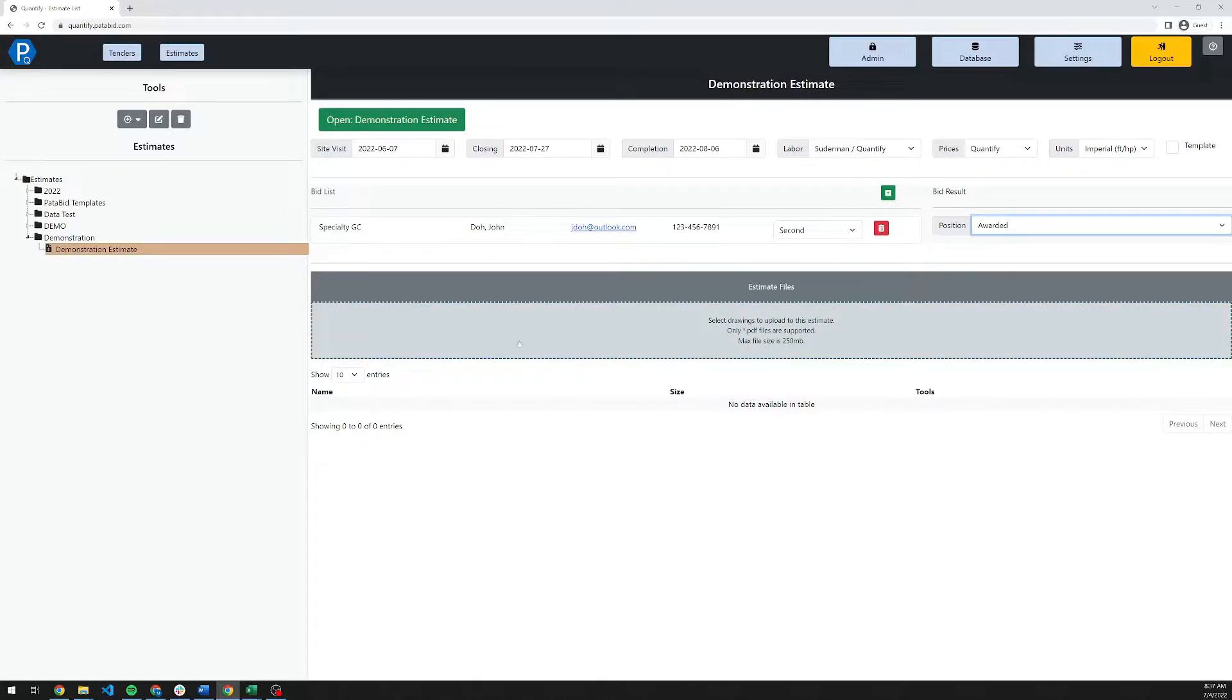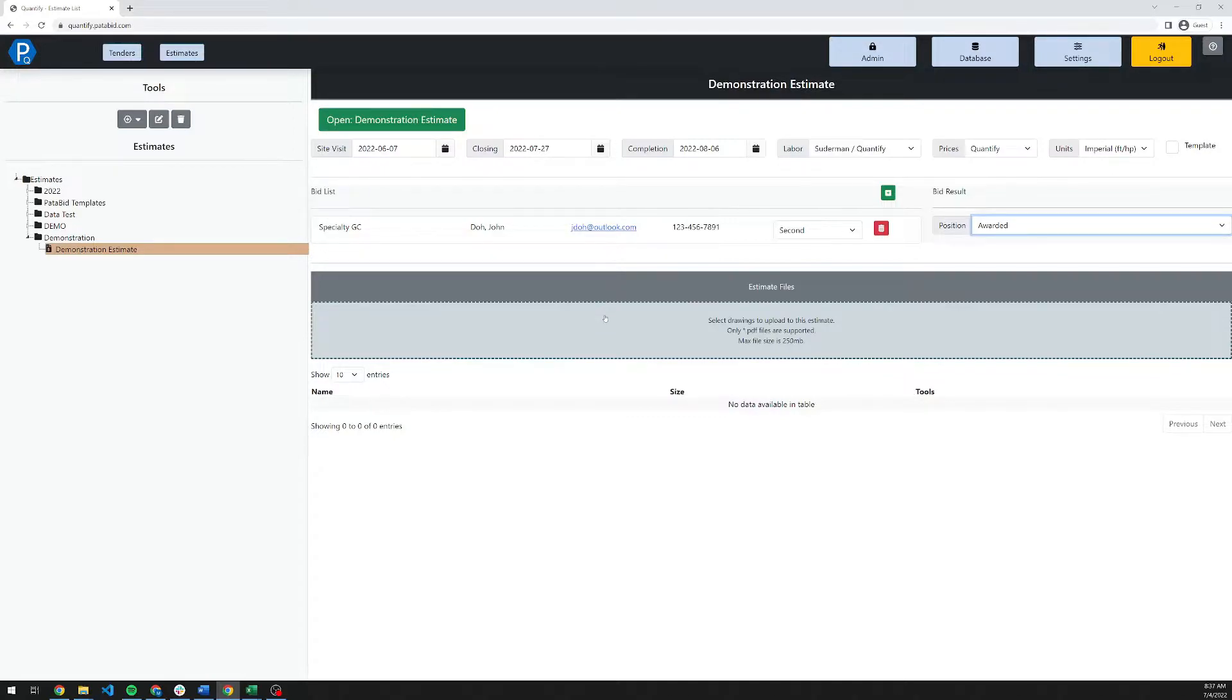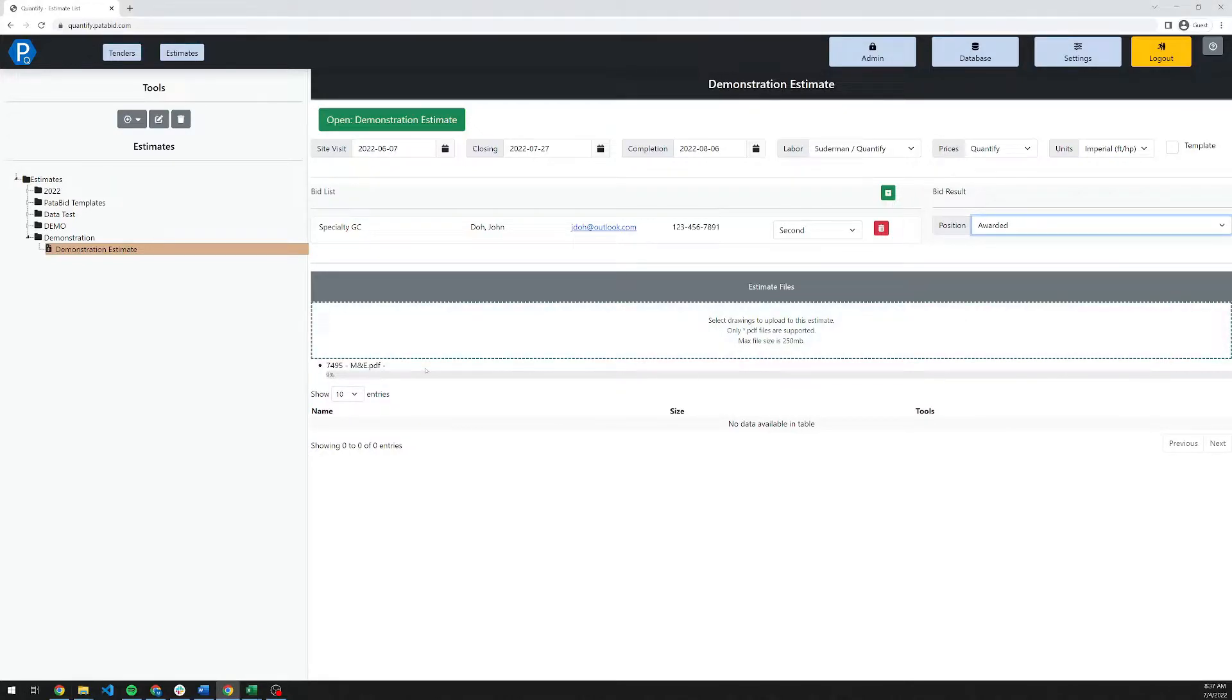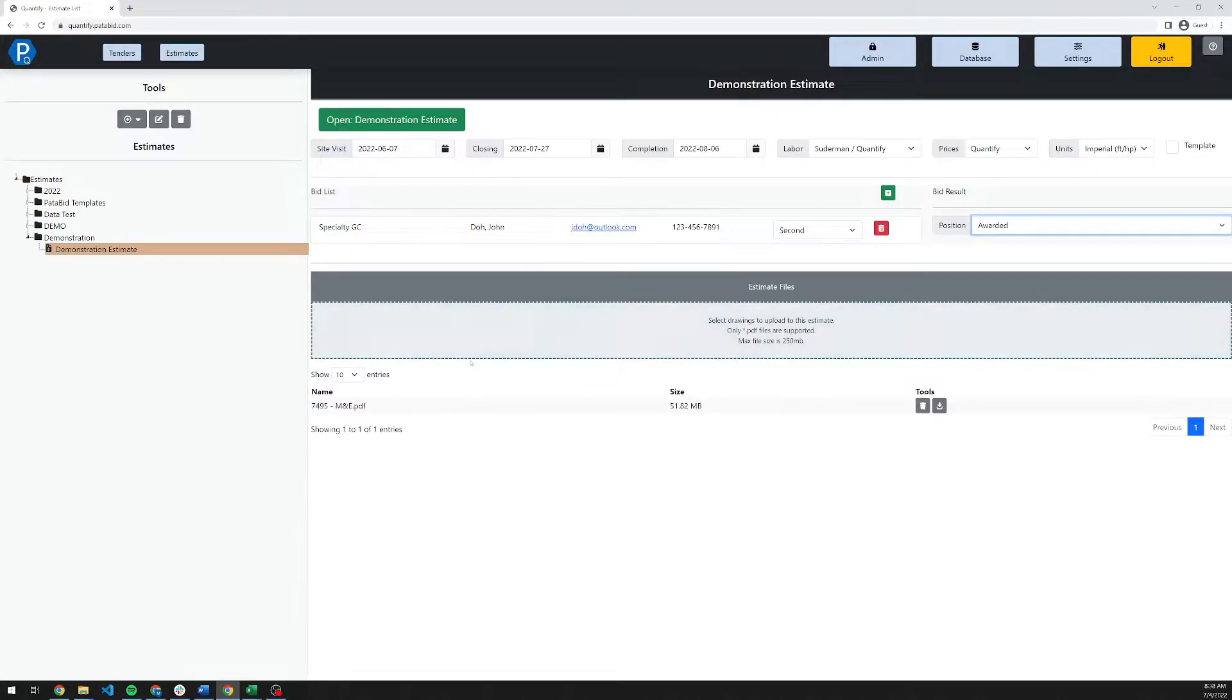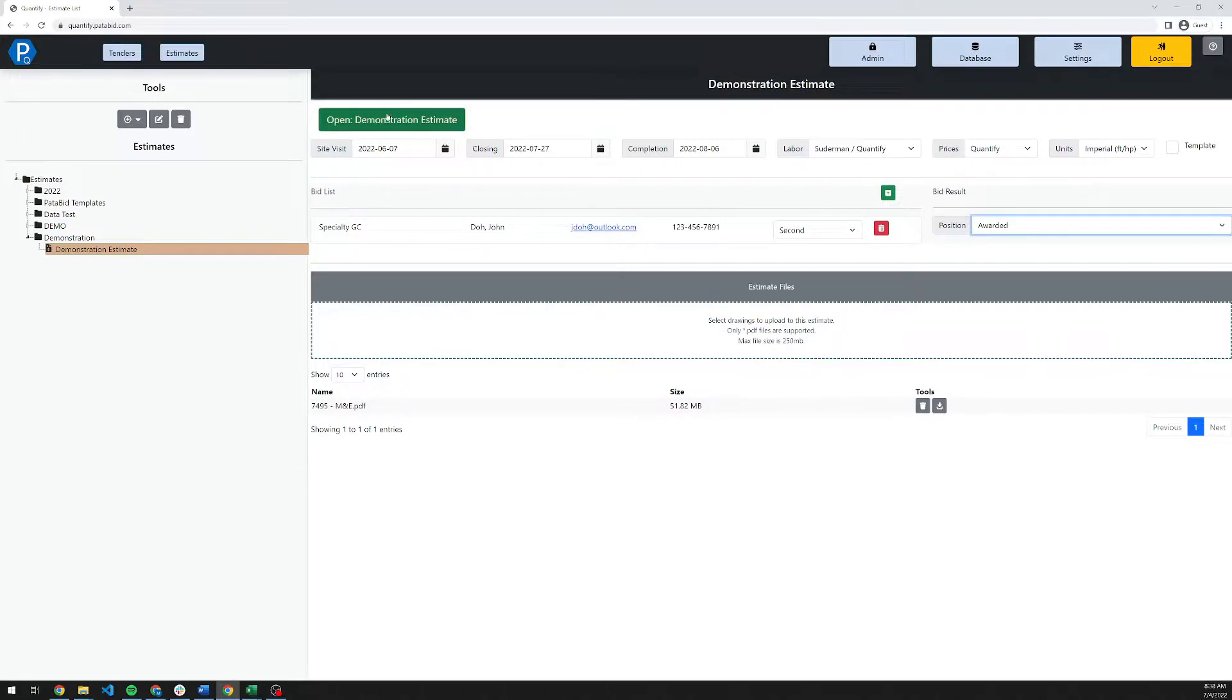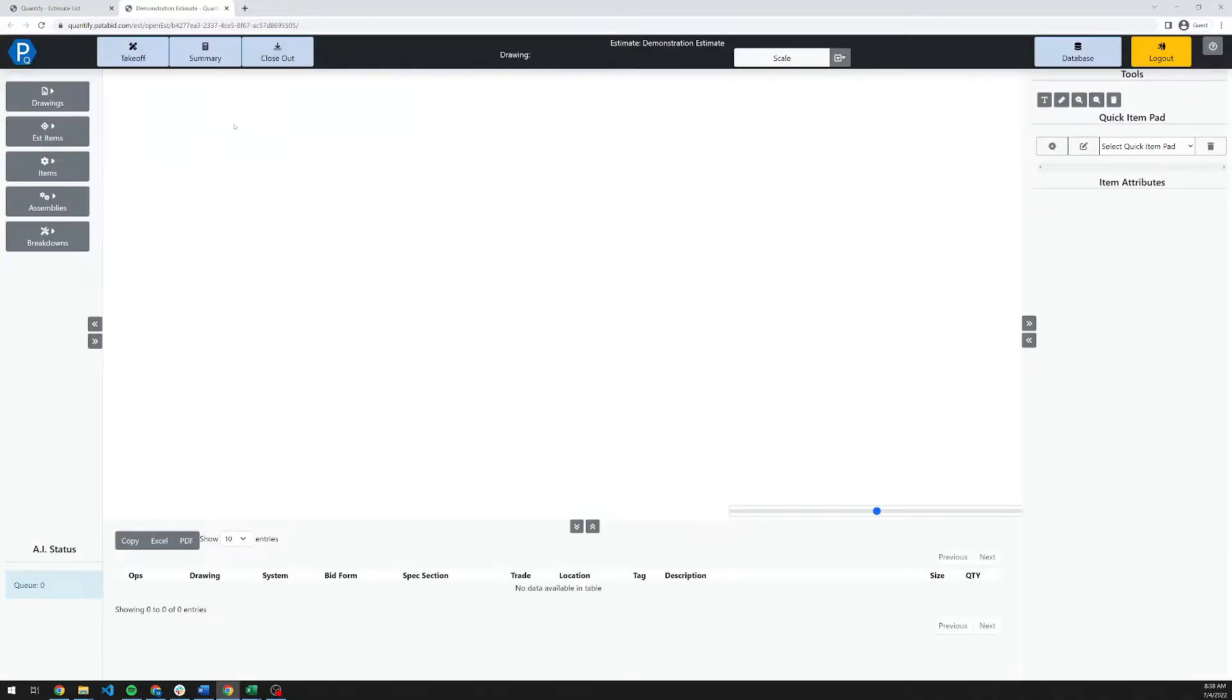Down here, we have the ability to enter in documentation. Drawings, specifications, whatever documents you want to upload pertinent to this estimate. Right now, the file format that is used is PDF. I'll bring in a drawing set here and drag my drawing set onto this box. It will upload into the platform. You can also upload specifications and other PDF documentation. At any time, you can add documents. If addenda are received or changes, you can just drag and drop them in. Once this is configured, you can select the open estimate button and this will launch you into the estimate.